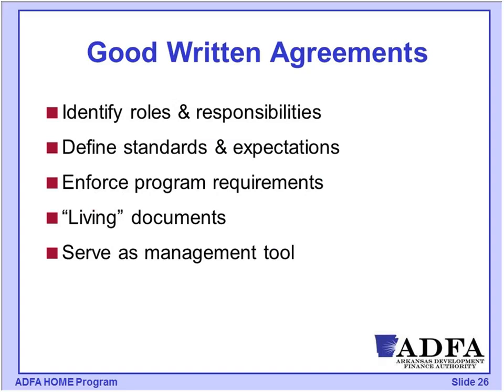So, things like if I have a change order, what's the process on this? Can the contractor simply say, oh, let's change this and I will simply bill for it? Or is there a requirement that they come back through the funders essentially on this for permission? These are where some of these expectations and standards would be put in place.